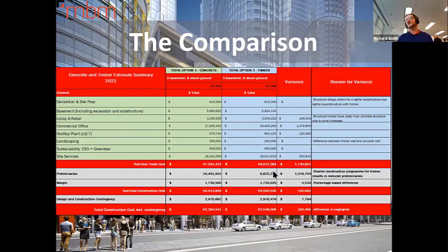And you look at the savings on preliminaries, and you see that speed aspect, and that potential to value time, commercialize time, and the need to lock in revenues earlier. And you can see that timber has a future, and I think that shouldn't be lost on anyone out here, because even with this commercial office, the fact that we had to spend more money to produce a timber building and superstructure, we can save that in prelims.